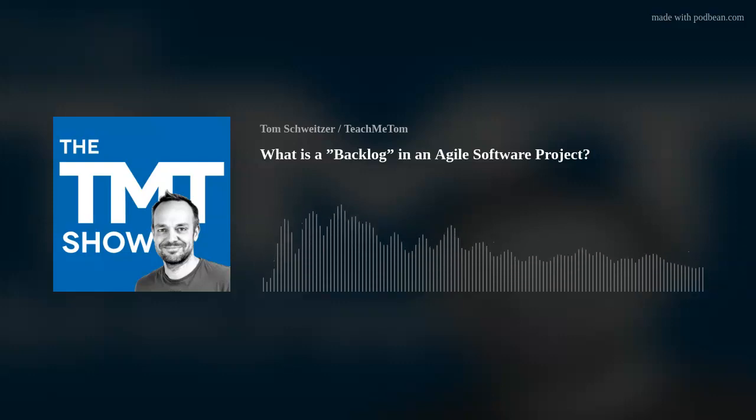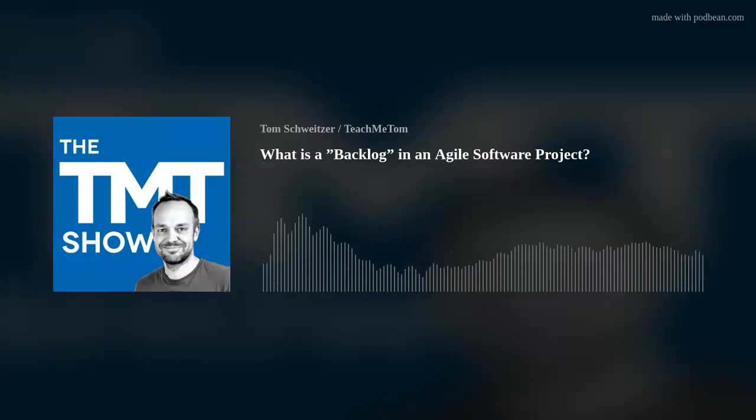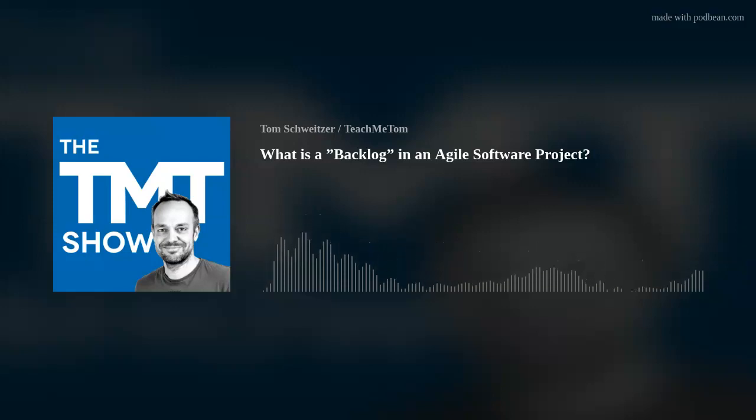We already mentioned that these user stories go into a list called the product backlog. Product backlog is basically a list of user stories that is ordered. The most important ones, the ones that we should implement first, are ordered to the top, and these are the ones that will be taken and implemented in the next iteration, in the next sprint.